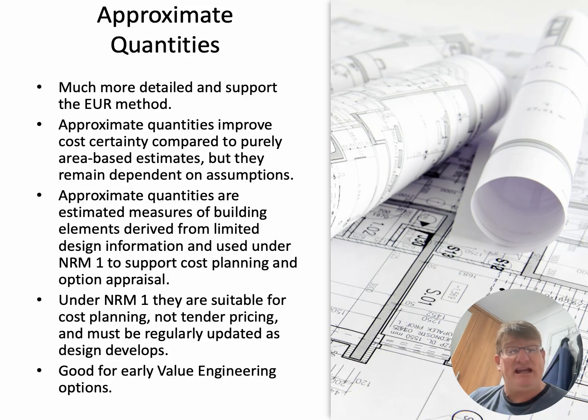So suitable for cost planning, probably not best for tender pricing because it's not accurate enough, and obviously regularly updated as the design develops. As the design develops, you get much more accurate information, and your rates will change because your quantities suddenly start to become much more accurate. Good also for early value engineering options, because you can compare different designs, different approaches, the use of different materials, so it gives you that degree of comparison.